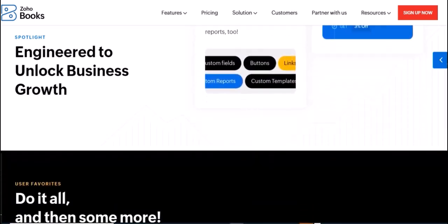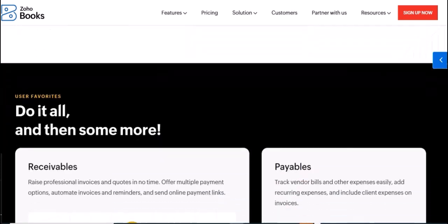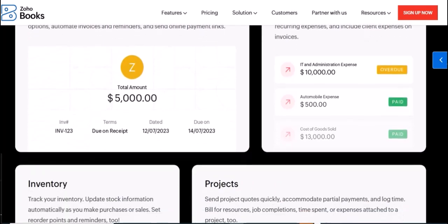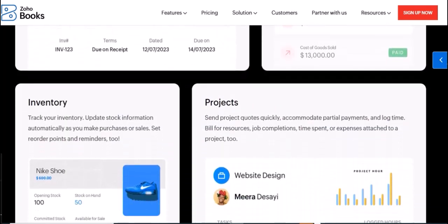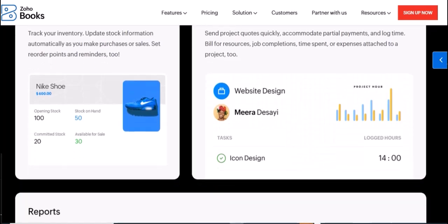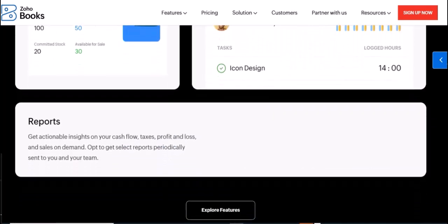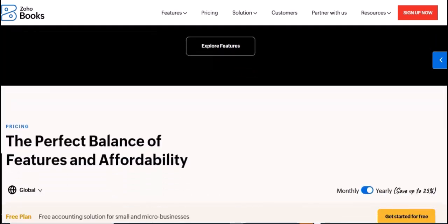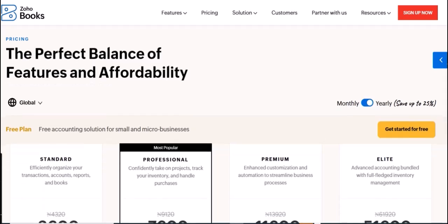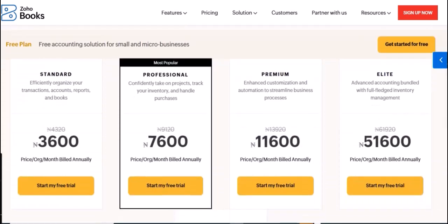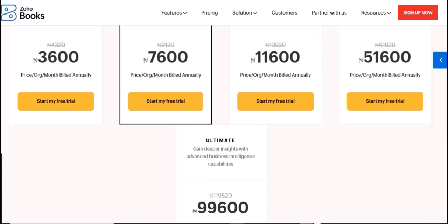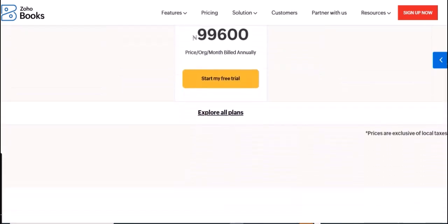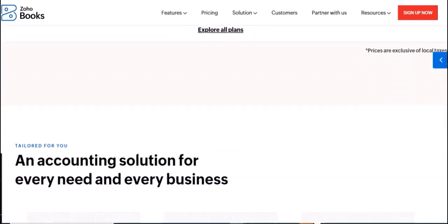When to use it. Well-defined projects. Fixed bids work best when the project scope, deliverables, and timelines are clearly defined and unlikely to change significantly. Predictable costs. If you have a good understanding of the resources required and can accurately estimate the project costs, a fixed bid can offer predictability for both you and your client. Building trust. For new clients or projects where price certainty is a priority, a fixed bid can help build trust and avoid potential disputes over hourly rates or unexpected charges.